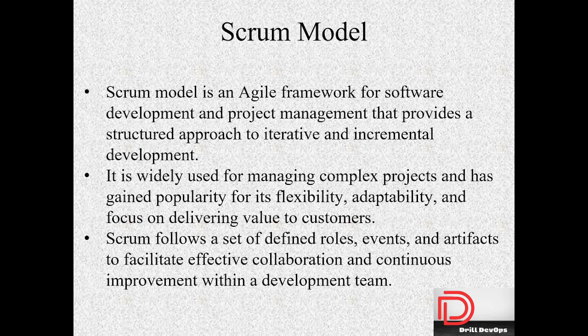Let's suppose you have a product owner, someone who takes the requirements from the client or the vendor, and breaks these requirements into epics, or big chunks of requirements, on a hierarchy basis. He prioritizes which one to develop first, and gives it to the Scrum Master and the development team. The Scrum Master is the one who picks these requirements and assigns them in the sprint for the development teams. The development teams understand and take these requirements and start developing.